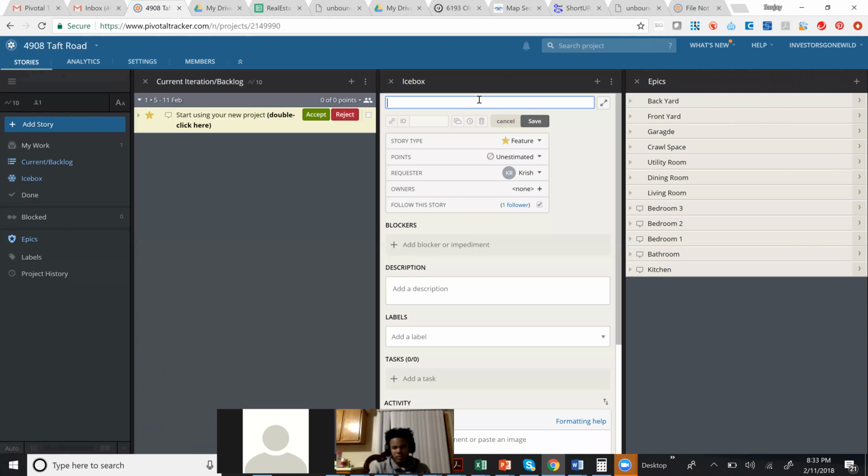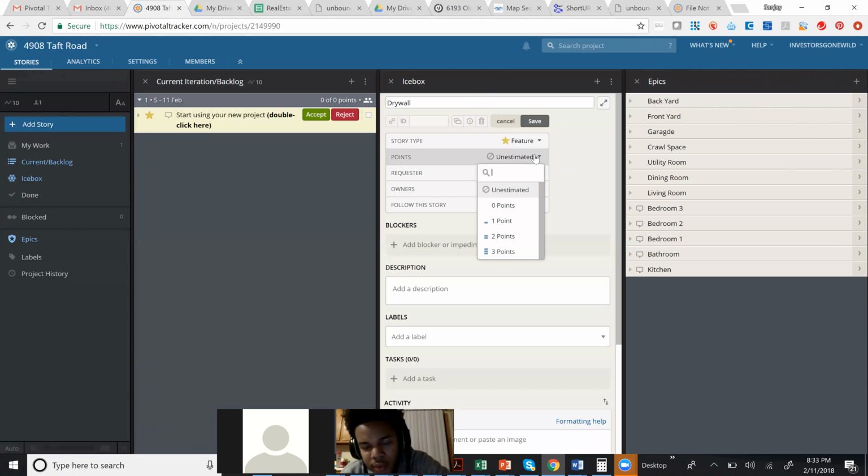Okay, so I want to create drywalling. Drywall. Story type is feature. So what kind of story is it? Is it a bug or is it a chore? It's a feature, meaning it's something that we're going to be building, right? Unestimated points. So let's use 1 point is 2 hours. 2 points is 4 hours. 3 points is 6 hours, right? So how much do you think drywall in a bedroom would take? Just drywall. About 4 hours. So that's 2 points.